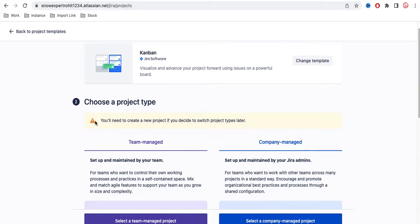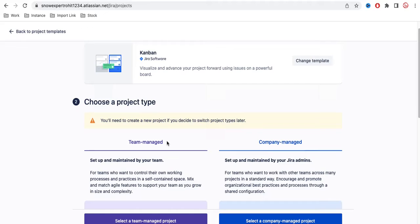If you see the warning, it clearly mentions that you will need to create a new project if you decide to switch project type later. So it is very hard to move from one project type to another. If you already created a team managed project, it is very hard to move it to a company managed project, and vice versa.